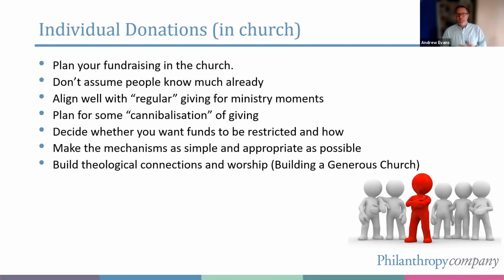This is particularly important. It's a thing lots of churches get wrong when they're doing giving internally. Decide whether you want the money people give to be restricted funds, and that's a technical accounting term. And if they are going to be restricted funds, how restricted are they going to be? So I was working with a church recently that had a building project, and they decided they were going to move out of their existing building and move into an entirely new building just down the road.